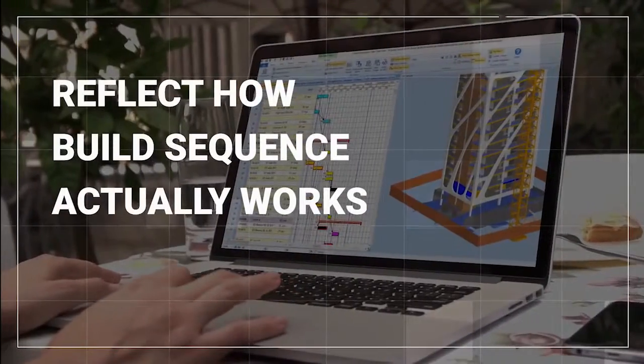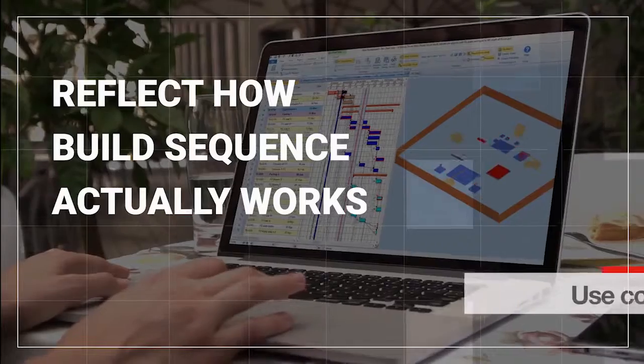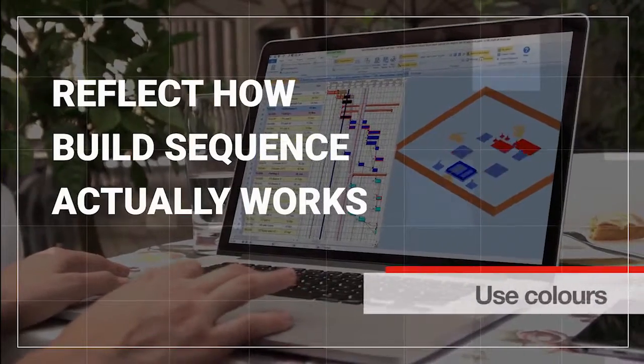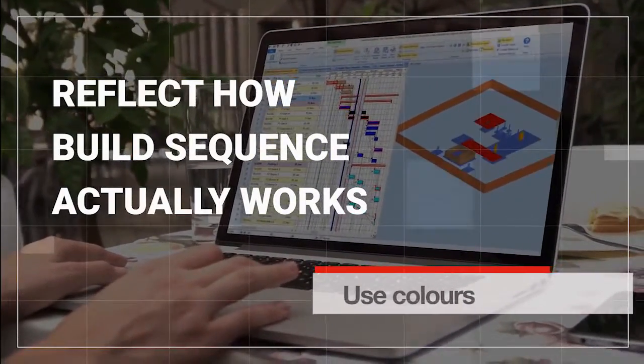You can split models down to better reflect how the build sequence actually works and define colours to be used to show different stages.